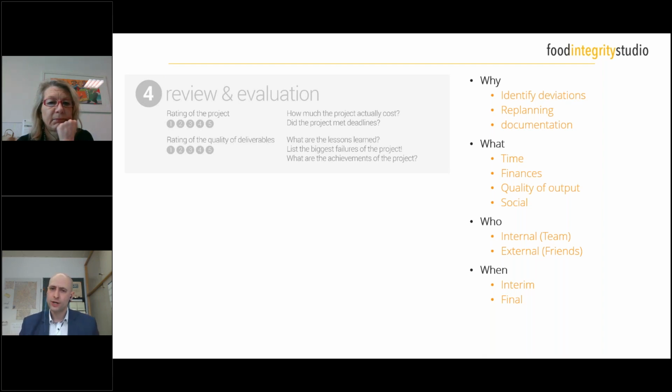A very important thing is also that you do it as a part of the documentation. The documentation is important to probably your project sponsor. It's probably also important for yourself. You would like to have your lessons learned documented. It might be that this is your first cheesecake, so you would like to have it documented. You document the interim steps, so that the next time you're baking your cake and encountering similar challenges, you have it already documented.